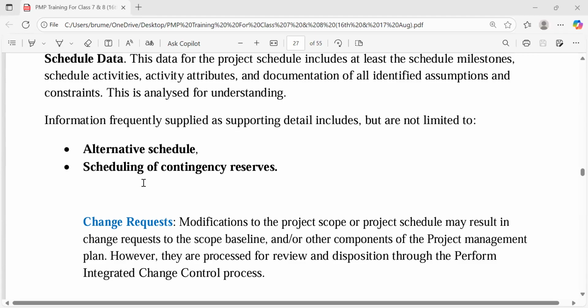Now, because you know that delay may likely happen, we call this kind of contingency reserves. Because you know, we call them the known unknown. That's another professional term for them, known unknown. You know that the rain may likely fall, and if it falls, it may impact on the start time. Would it really fall? You are not sure, but we are in the season.